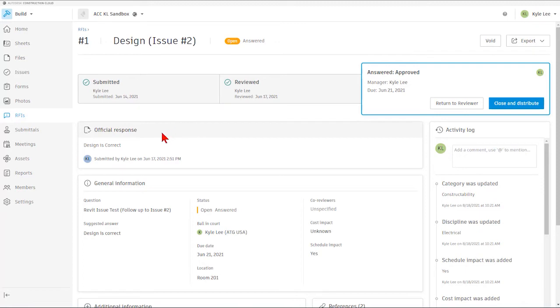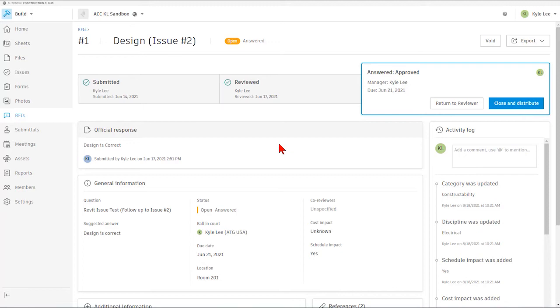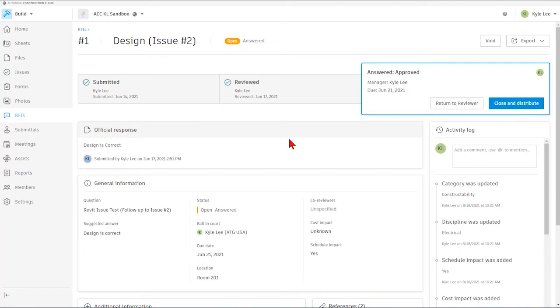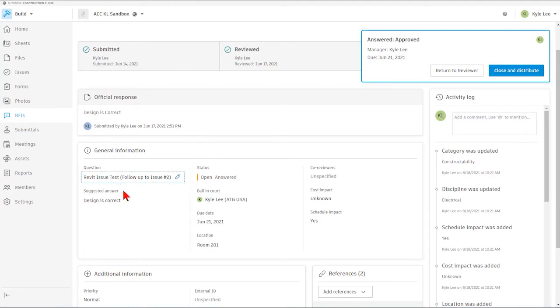We can see in this particular case here that we have this RFI that's been submitted and it's been reviewed, and it appears that it's been approved. So at this point, we can close and distribute this particular RFI. We can see the official response area for the RFI, as well as the general information related to our RFI. We can see the RFI question and what the suggested answer may have been.